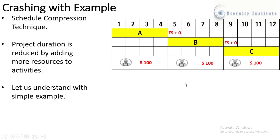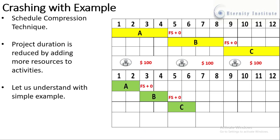Each resource is costing us $100. Now, what if we increase the number of resources on these activities? As a result, the duration of each activity decreases. Let us consider this scenario — the same project with three activities combined with the finish-to-start relationship.